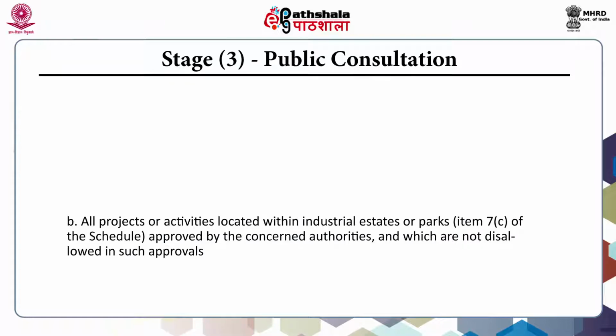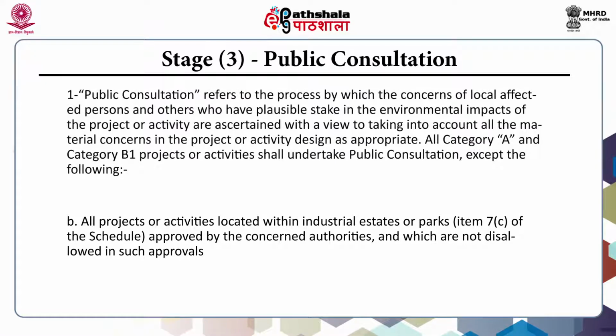Stage 3, public consultation. Public consultation refers to the process by which the concerns of local affected persons and others who have a plausible stake in the environmental impacts of the project or activity are ascertained, with a view to taking into account all the material concerns in the project or activity design as appropriate.